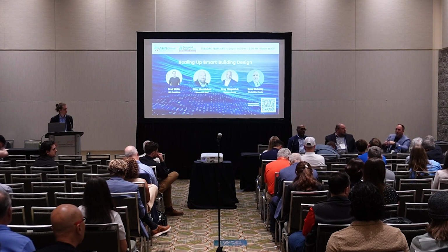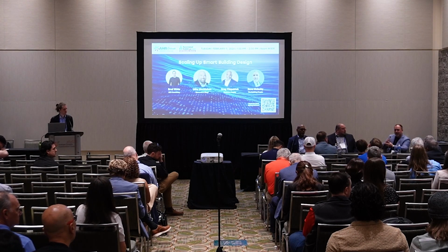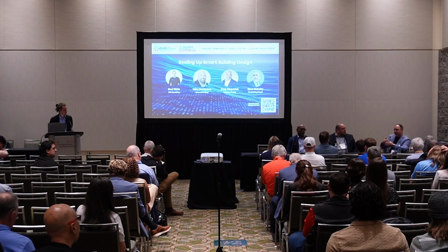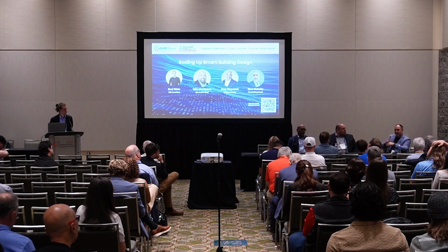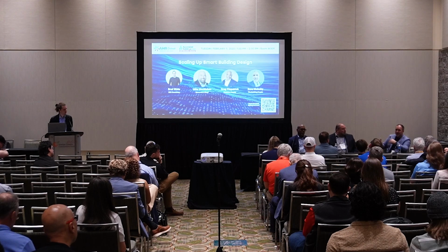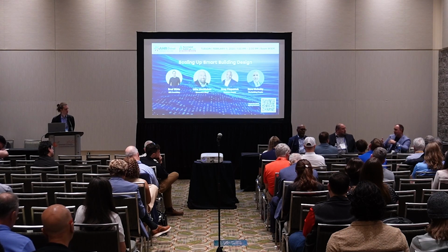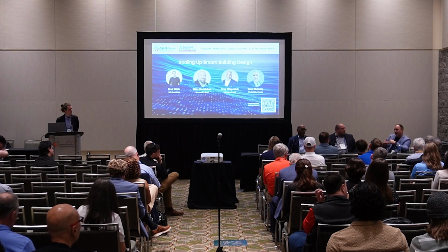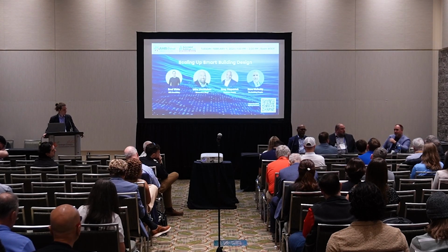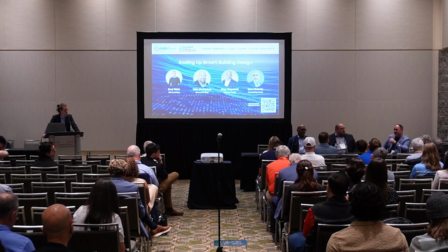I don't think you should wait till the end of the project to determine that. I think as things are installed and brought online, a good MSI is testing all those systems to make sure that functionality is available, so we can identify it up front before it becomes a problem. And if it's too late, well, what are we really delivering at the end of the day? It's not exactly what the owner wanted to see. Yeah.